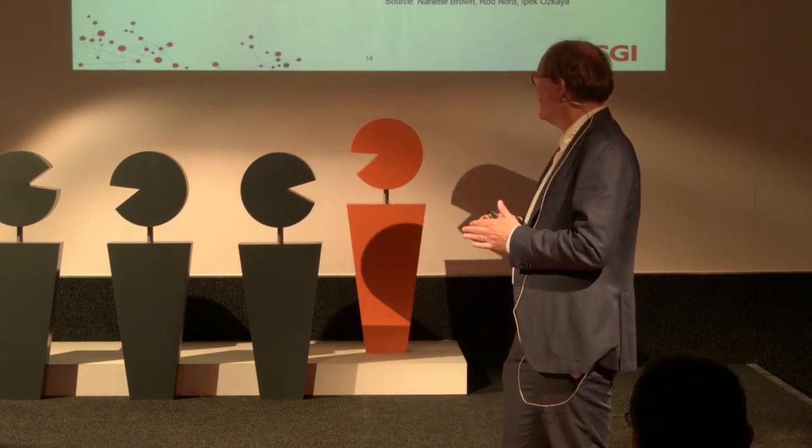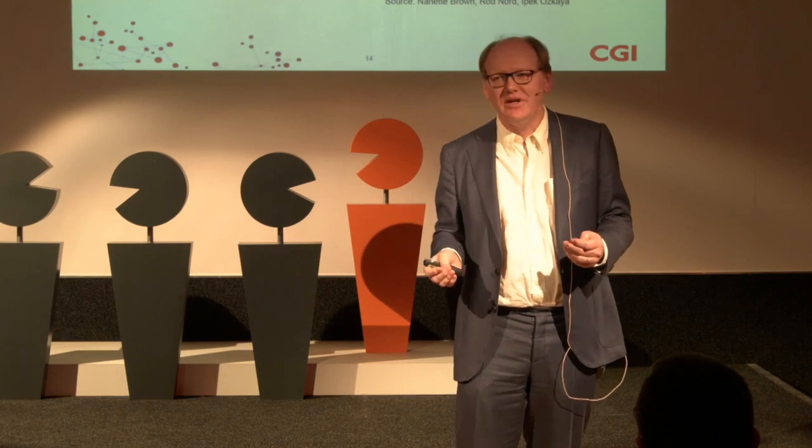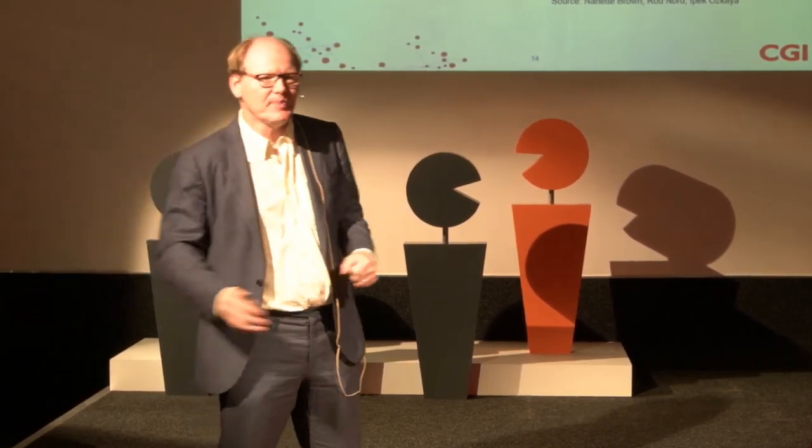It's basically those user stories that have a big architectural impact. If you can anticipate those, then you can start working on your architecture components in time to accommodate those requirements. Now, of course, sometimes somebody tells you, we have this jumbo jet coming in 2 weeks from now. No way can we build the concrete runway that we need to accommodate a jumbo jet in 2 weeks. But we can do something quick and dirty. We can cut some trees, and we can lay out some stuff temporarily, like the army does sometimes, and then the jumbo jet can land. If more come, then we will fix it and make it into concrete. And if that was the only jumbo jet, we will just break it down again.